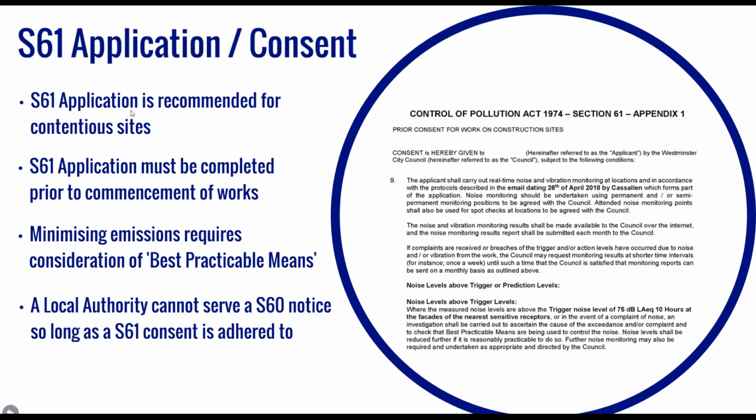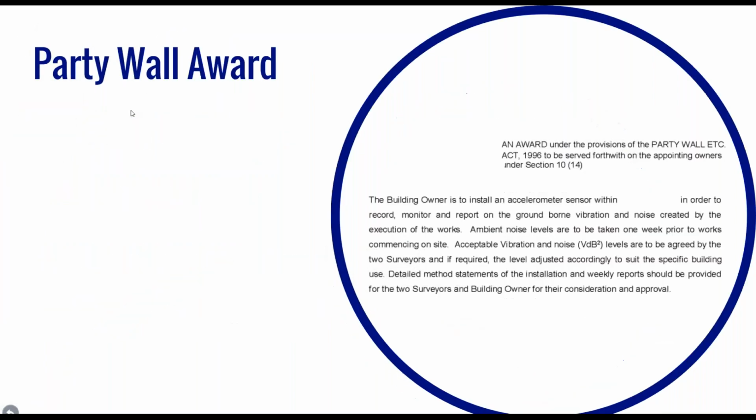Moving on to the last one, a party wall award, otherwise known as a party wall agreement, is the document that's produced by two party wall surveyors acting for respective owners where construction will take place. It commonly includes a schedule of condition reports, details relating to the manner in which works will be undertaken, and conditions that need to be fulfilled throughout the works, which can typically include a requirement for vibration monitoring to reduce the risk of structural damage.